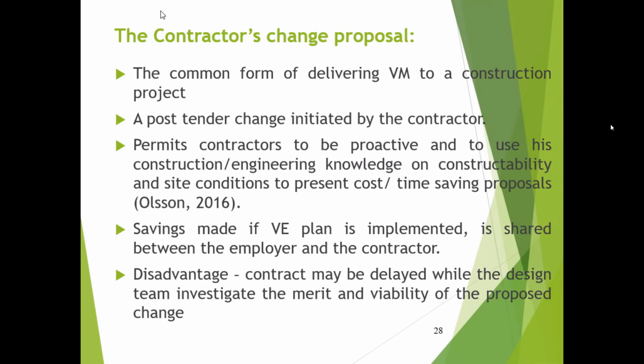Okay, that disadvantage is there. So that is there for any kind of project. That is the reason this can often be done in parallel by a separate team while they are working on the design, and the proposals can be evaluated, and whatever additional thing they come out with can be evaluated.